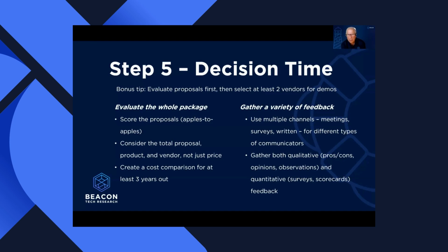And back on the survey part of it, when you are surveying everything, the demos, the people's review of the proposals, etc., a couple of quick tips. One is always include both the quantitative and the qualitative answer space for each task in the script or each review point that they're writing about the proposal. And use a 6-point scale for the quantitative part, because that forces them to one side or the other of the median. If you use a 5-point scale, 4 out of 5 times they're going to mark everything a 3. You want to push them to decide, is it really higher or lower? So use a 6-point scale.